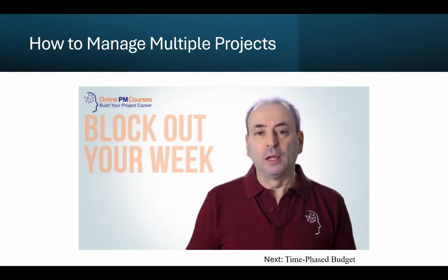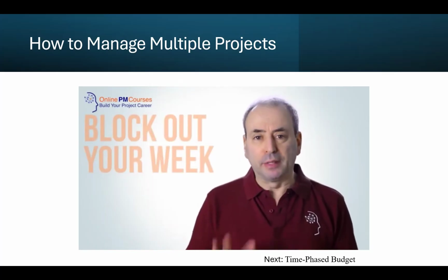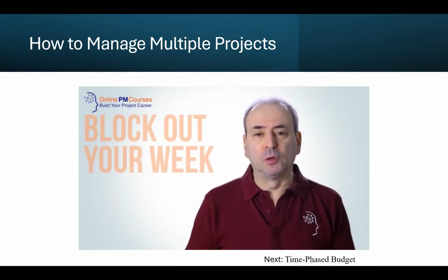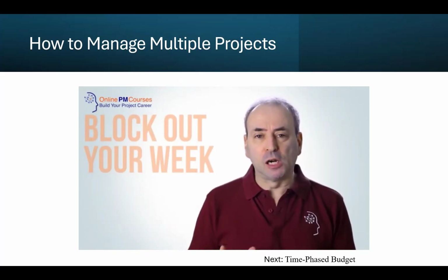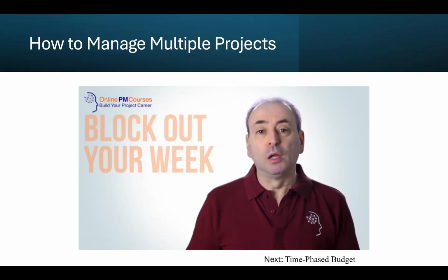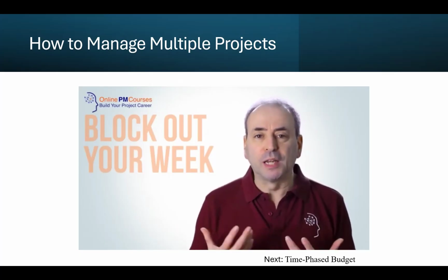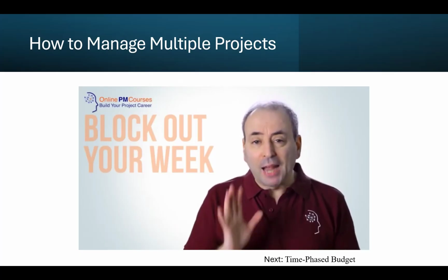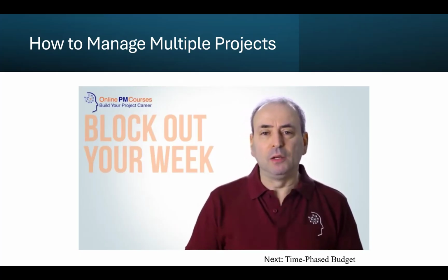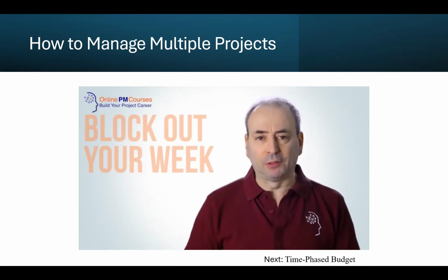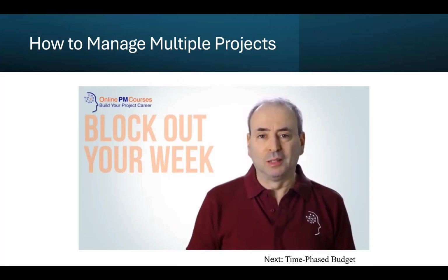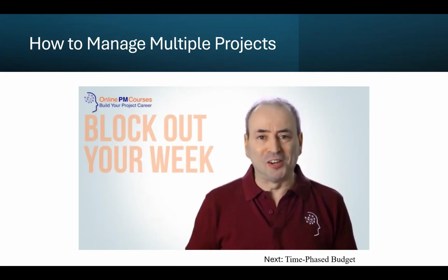My 8th strategy is to block out your week. At the end of each week, review what's coming up in the next week, the key milestones, important meetings you've got to attend, and block out chunks of each day for each of your projects. Give each project the right amount of time based on not only its priority as a project, but the priority generated by what's going to be happening in that week. And always leave time in your diary for surprises. Block out spaces to deal with problems that you don't know this Friday afternoon will occur next week.